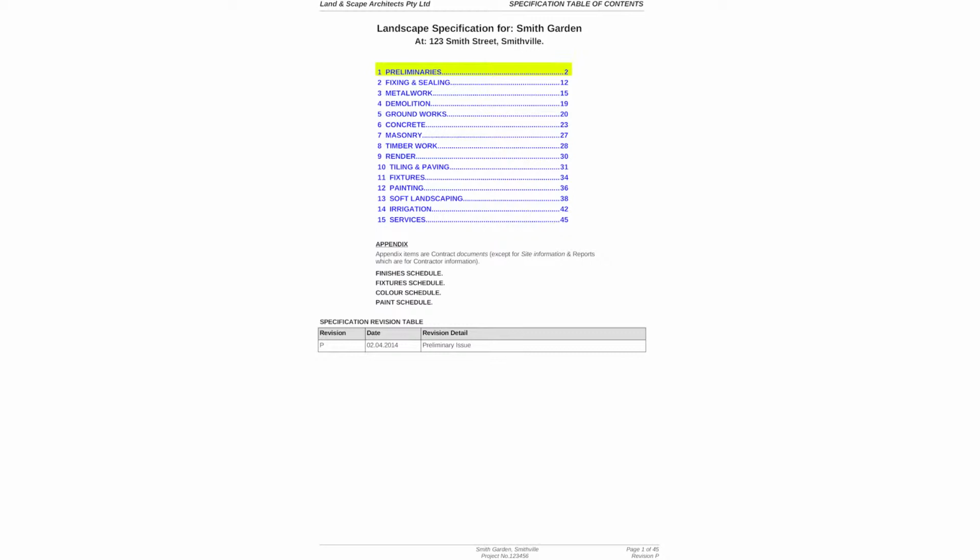No general requirements section exists. Some say it is for subcontractors and preliminaries for head contractor, but a technical spec is needed by both. Head contractor specific detail is best in the head contract.